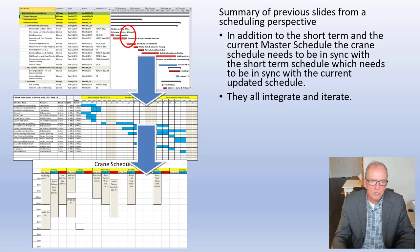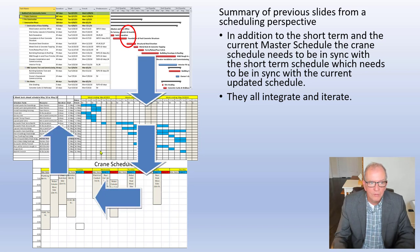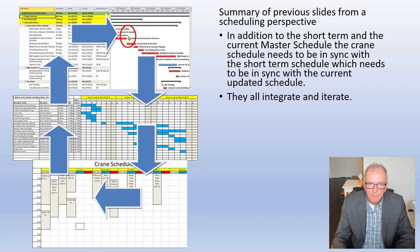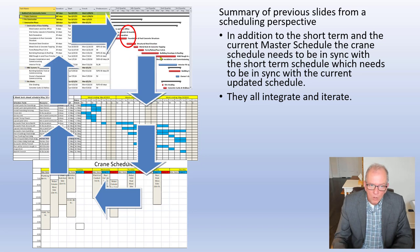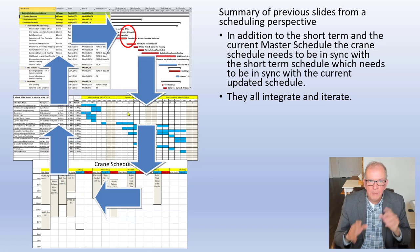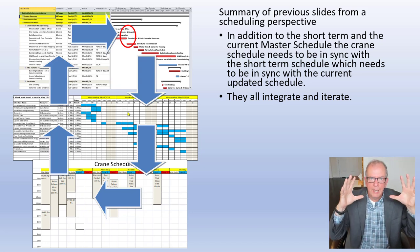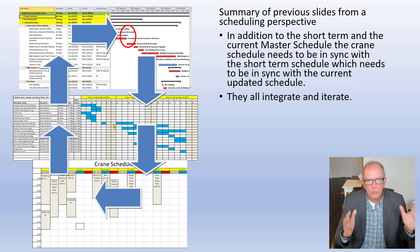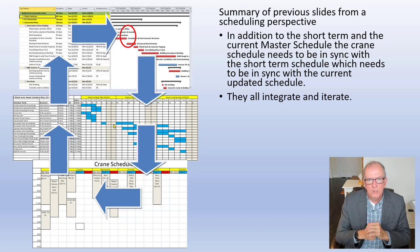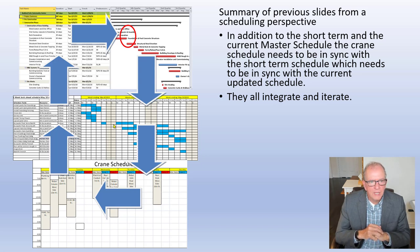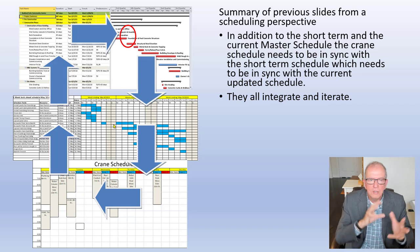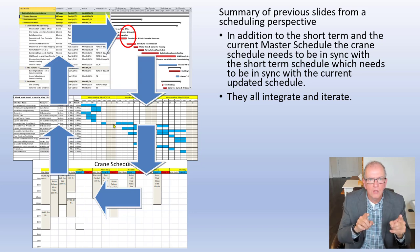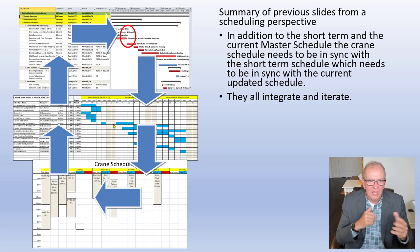What's happening here boots on the ground needs to feed back into the master schedule when it's updated so we can see the ramifications and the impacts. We can compare it and then that's going to help us look at perhaps some longer term adjustments and changes. That's also going to advise us on the short term with the site supers development of the short-term look ahead. You see, PMs have a more long looking view lens of the project, site supers tend to have a shorter lens, and they need to work together to be effective. This is the key point: they integrate and they iterate. We're constantly making these adjustments, but we're doing it with both the short-term and the long-term in mind. Otherwise it's kind of chaos, chaotic, gets more adversarial, everybody's having turf wars.